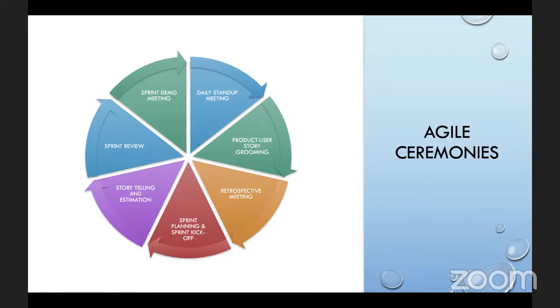Sometimes team members will send an anonymous message to the host of the meeting, the Scrum Master. They talk about story A, and he will say, let's vote. Everybody will send their points to him. The one that gets the highest score, the highest same point, maybe 3 points, with 3 or 4 people saying 3 points, we go with 3 points, right? If somebody says something extreme, like 10 points, while everybody else is saying 3 points...